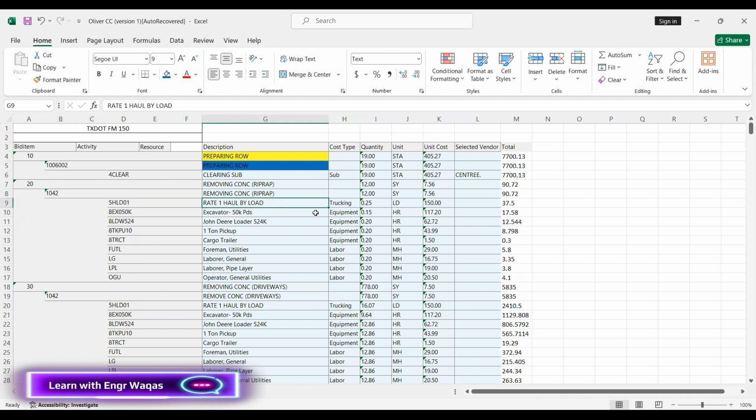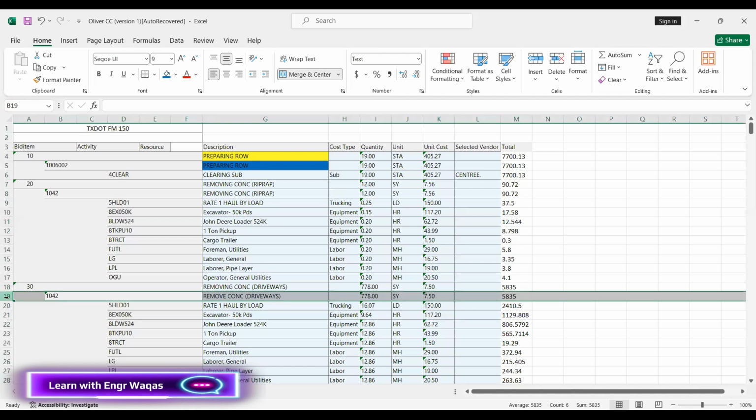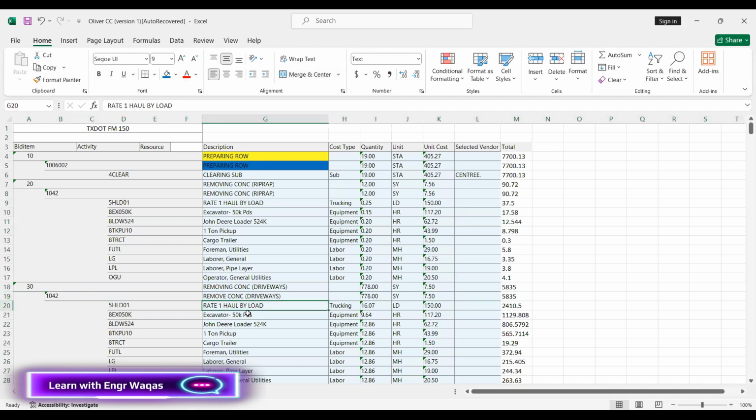And there is a column explaining all the resources and the resource types: manpower, material, and machinery. Same again. This is an activity, same repetition under cost code, and the working resources on this activity, and then their category, their rates, the units in which they will be measured, their cost per unit, and then their total cost. And this is going to help you.